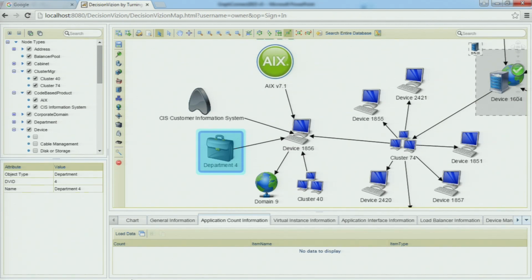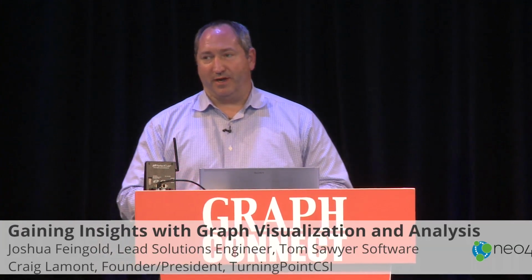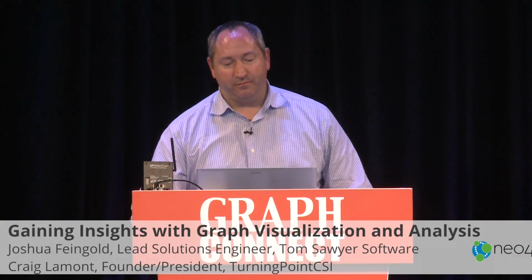Now we can also drill into this department and see how many people are involved in it. Is it 100 people across 5 different states? Or is it 5 people in one state? Basically, we're saying this department uses this machine, which in essence is saying that they're using this software. This little Star Trek badge is the icon that we're using for applications. So this is the department that we might be affecting. Those are 2 totally different organizational change management risk profiles: changing something that affects 100 people in 5 offices, or 5 people in 1 office. So immediately, we're giving you more information about how you need to plan for this migration.